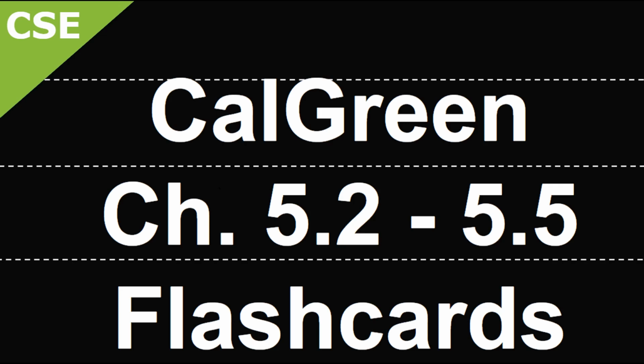Pollutant control during construction. The following requirements. A MERV 8 return filter should be used for HVAC systems per ASHRAE 52, or a filter with an average efficiency of 30%. Also, you must replace filters at the end of construction. Next, you must cover duct openings to reduce dust in the system during construction. The goal here is to enhance HVAC equipment efficiency and indoor air quality by preventing construction debris from building up in air ducts during construction.